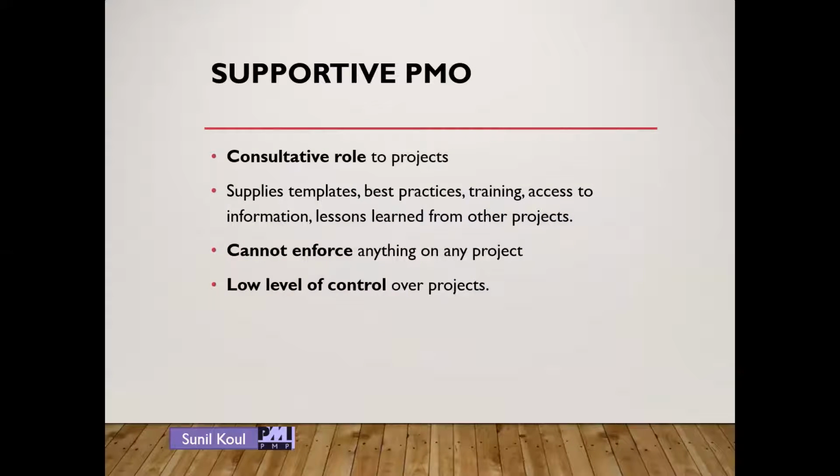In supportive PMO, you will see that they don't have so much control over projects. They have a very low level of control over projects. They cannot enforce anything on a project, but they are just responsible to share the templates, best practices, training, access to some information or lessons learned from other projects to the project resources. Maybe they are working on different projects. They are just supporting them and sharing these resources with them. That is the role which supportive PMO performs.